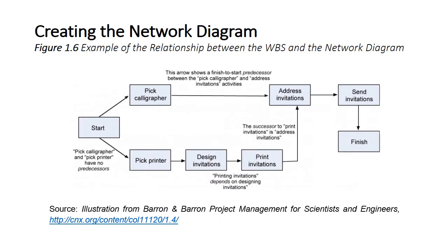Many project managers use network diagrams when scheduling a project. A network diagram is used to help visualize the interrelationships of project activities. Network diagrams provide a graphical view of the tasks and how they relate to one another. The tasks in the network are the work packages of the work breakdown structure. All of the work breakdown structure tasks must be included in the network as they have to be accounted for in the schedule. Leaving even one task out of the network could change the overall schedule duration, estimated costs, and resource allocation commitments.